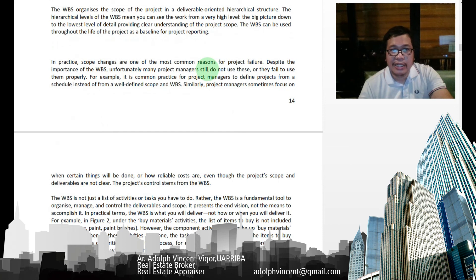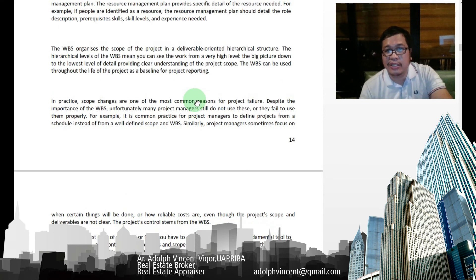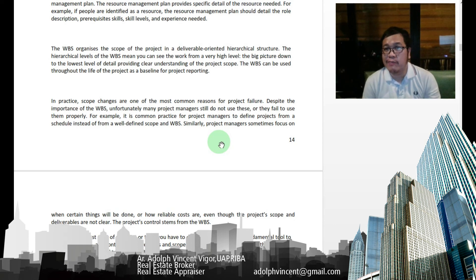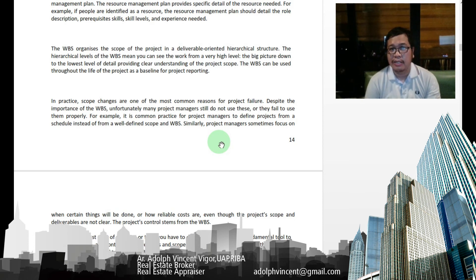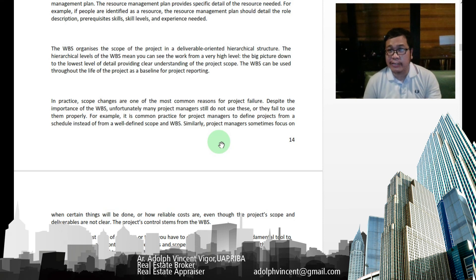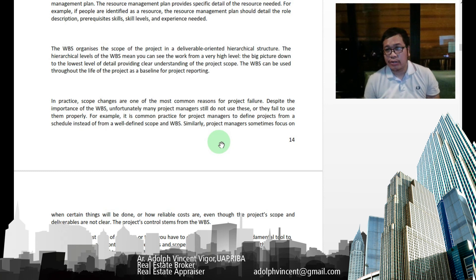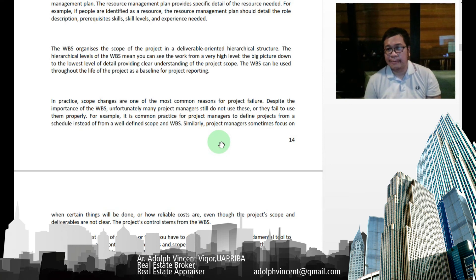In practice, scope changes are one of the most common reasons for project failure. For example, in residential buildings, the client often changes their mind on many things, which causes the project scope to change, resulting in going beyond the allotted time and budget. It's really important at the beginning that you find a way to talk to the client and detail everything in the contract, so that any changes in the project scope can be more manageable.